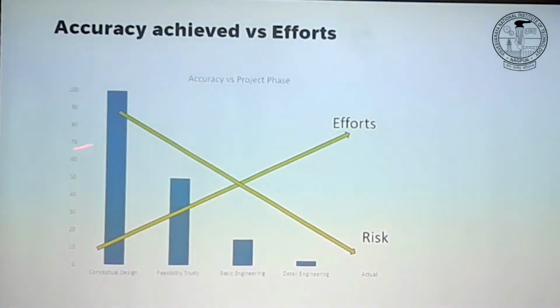So the percentage plus minus error was here, let's say plus minus 70%. What it means is, in a very early stage of the project, you thought I will produce this mobile for 50,000 rupees because you know I need components A, B, C, and you said another 20,000 for things which I don't know now.